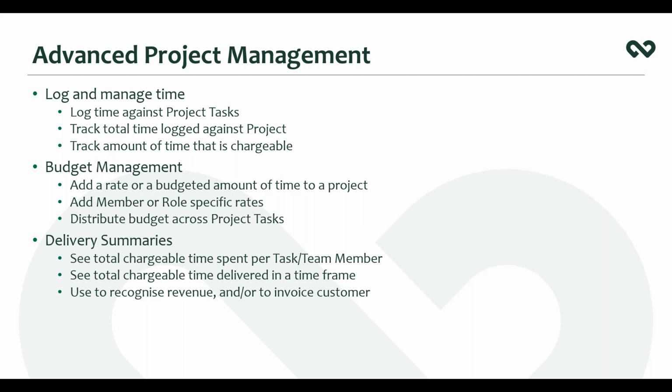You'll be able to take the combination of that logged time and that budget that you've attached to a project to work out the revenue that you've delivered for that project and be able to recognize that revenue, or even use it if you use invoicing in Workbooks to invoice that customer.